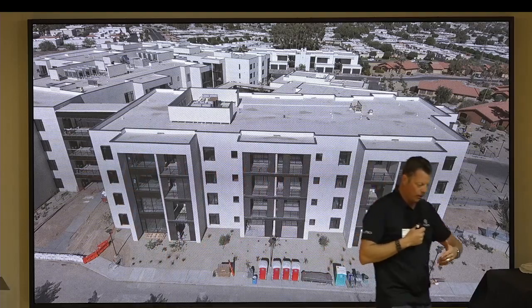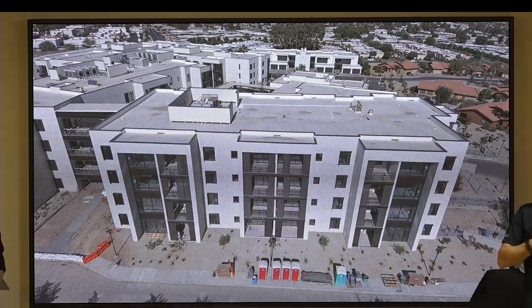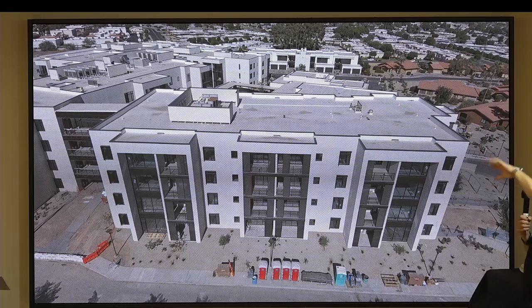We've got to complete that work. We've left that out so we could get a lot of long stuff like countertops and rolls of carpet, stuff that doesn't fit into an elevator, up into the building. So we're at a point now where we can coordinate with when folks are moving in, putting access on one side or the other for us to put a boom lift up there and get those done. That work will start next week. And let's see, I think that's pretty much it for the site work operations.